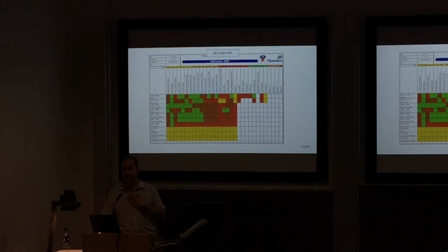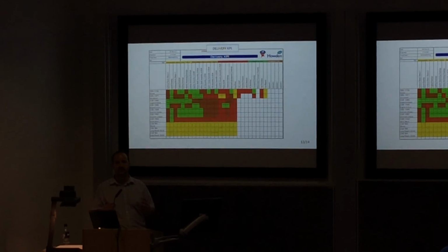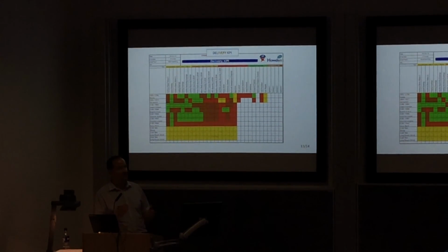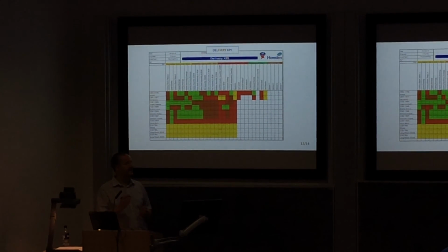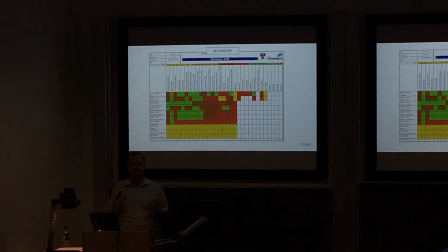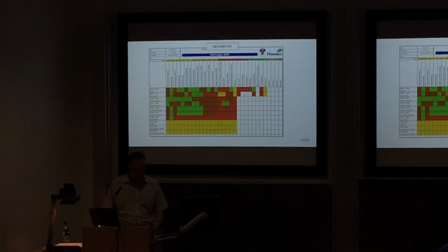So I understood what was required, and I understood what I needed to do to rectify the situation, which was recruit another draftsman, strengthen up the team, and manage through the difficult process. Again, it's very important to be able to visually see that without having to dig into the details every time, and it will also allow me to prioritise which of the projects we assign people to, because you can see at a glance the ones that have got difficulty and the ones that are going well.